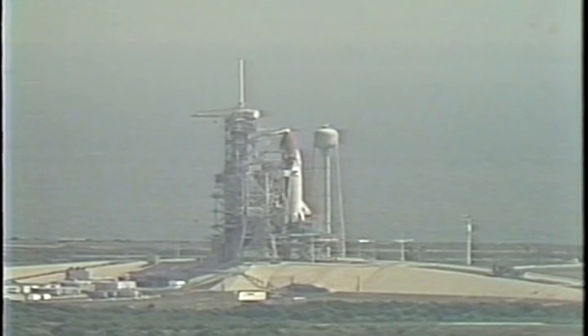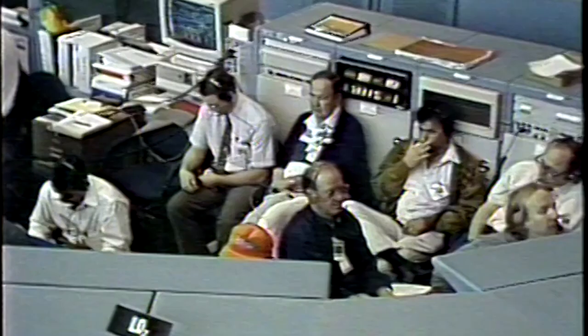This is Shuttle Launch Control at T-minus 9 minutes and holding. We're about 4 minutes now in addition to the hold. We already had it 10 minutes, so we've been in this hold about 14 minutes now. The team is discussing a blown fuse on the mobile launcher platform and whether or not we need to run any additional tests.